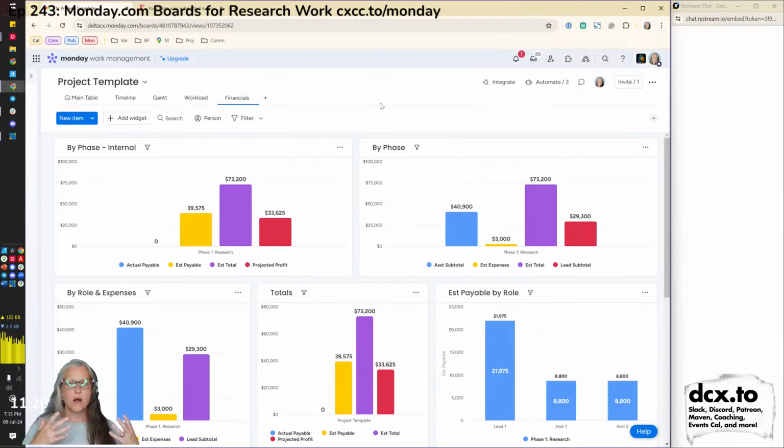My team are marked up. And sometimes I use that markup because I estimated badly. My team spent more time than I expected. So we pull some money out of my profit or markup and we make sure the team gets the work done, even if it means that money comes out of my pocket. That's fine. I do not go back to clients and go, oops, I didn't estimate right, please pay. So I want to make sure I have a good profit budget, a buffer there in case I have estimated badly, and to make some money as well.